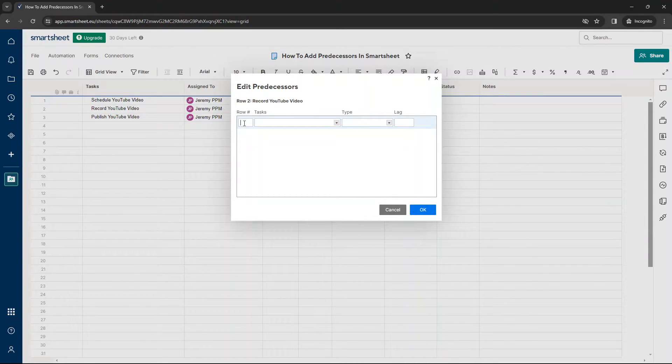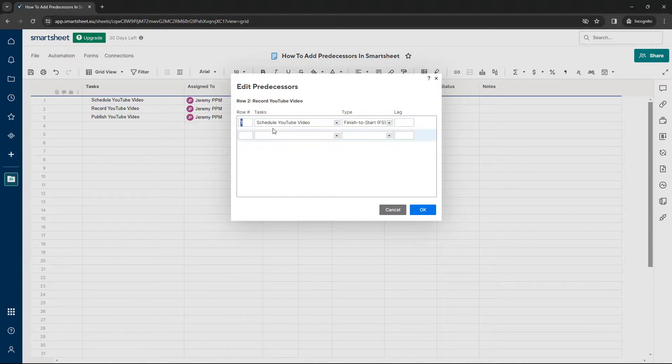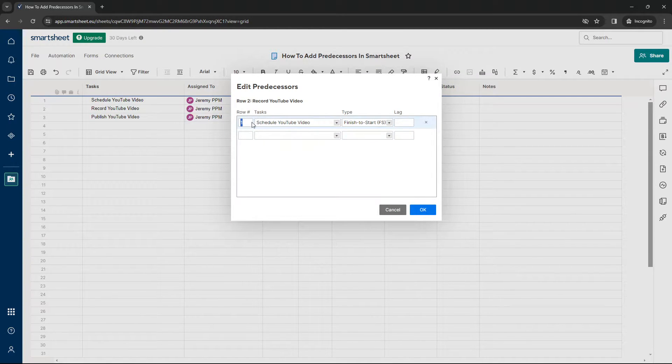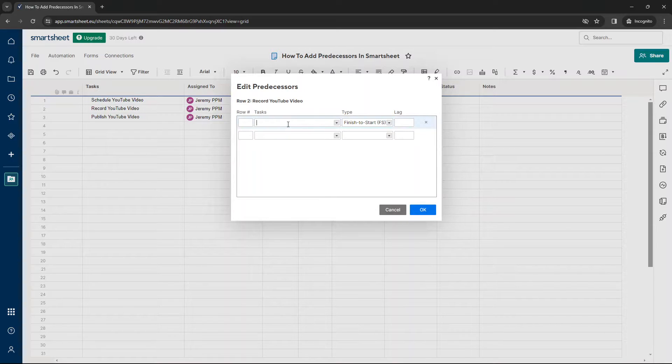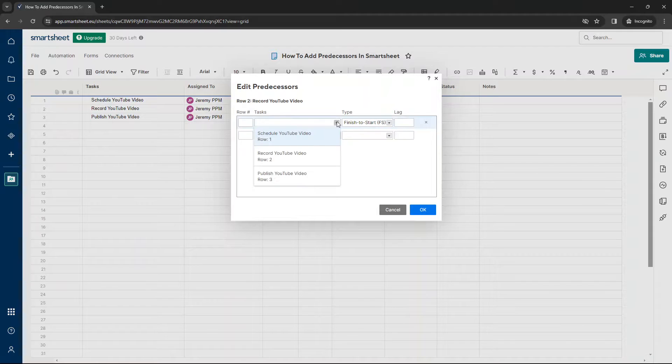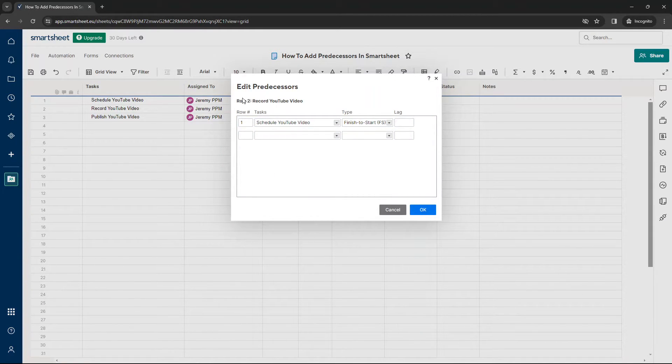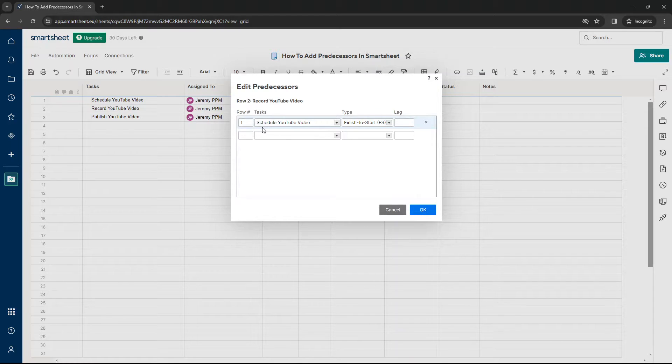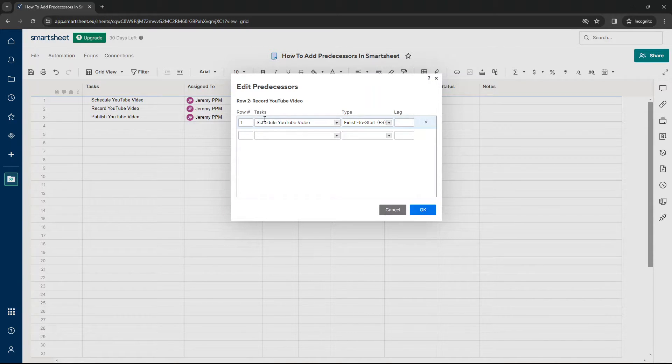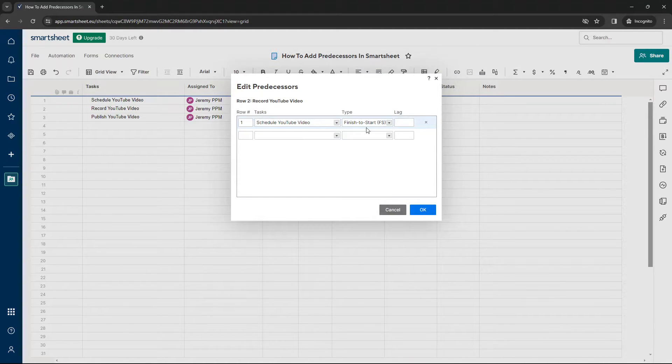Now, at this stage, we could put number one in and it will identify the task. Or alternatively, you could wipe that out and you could just select the task. So what I'm essentially saying here is for row two, we need there to be a predecessor on row one. So essentially, it's related to row one. There's a dependency on row one.